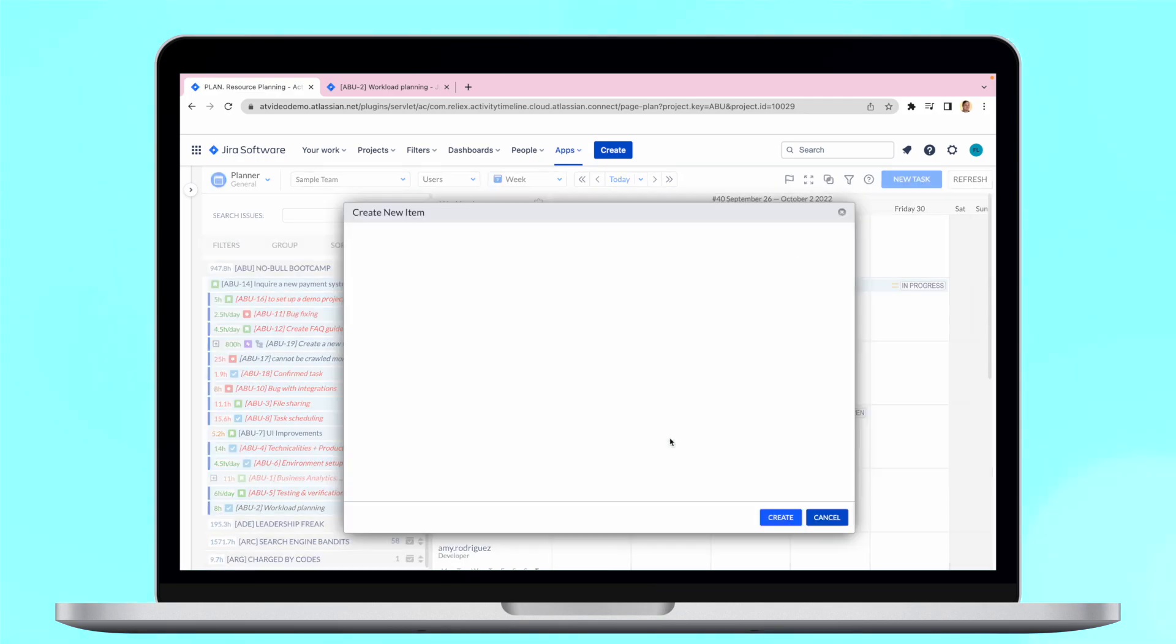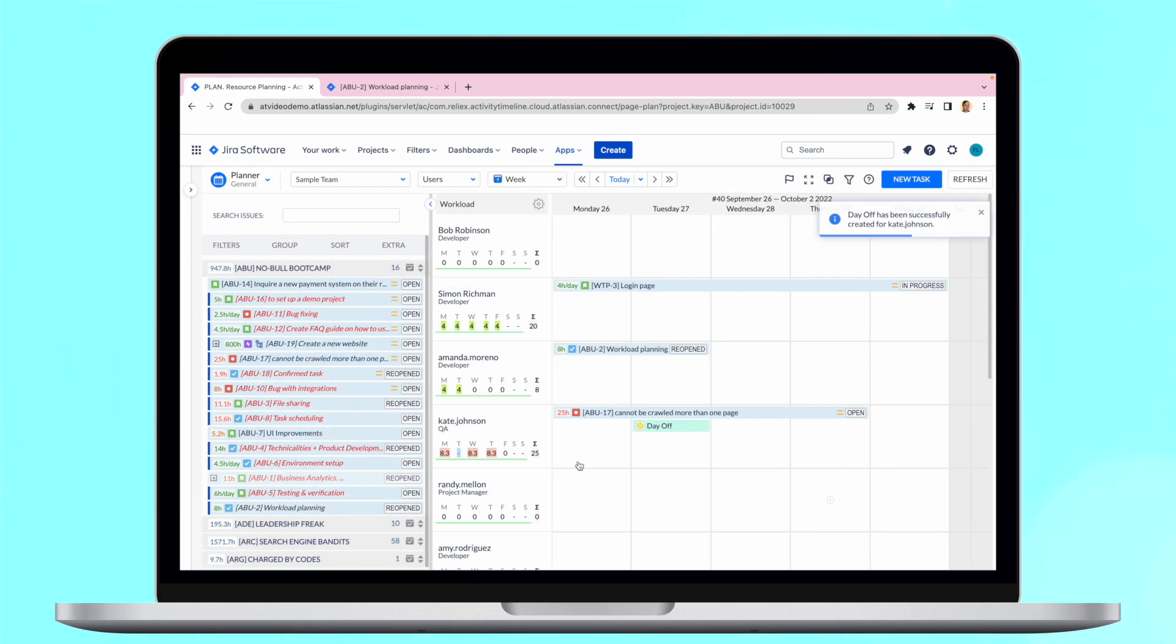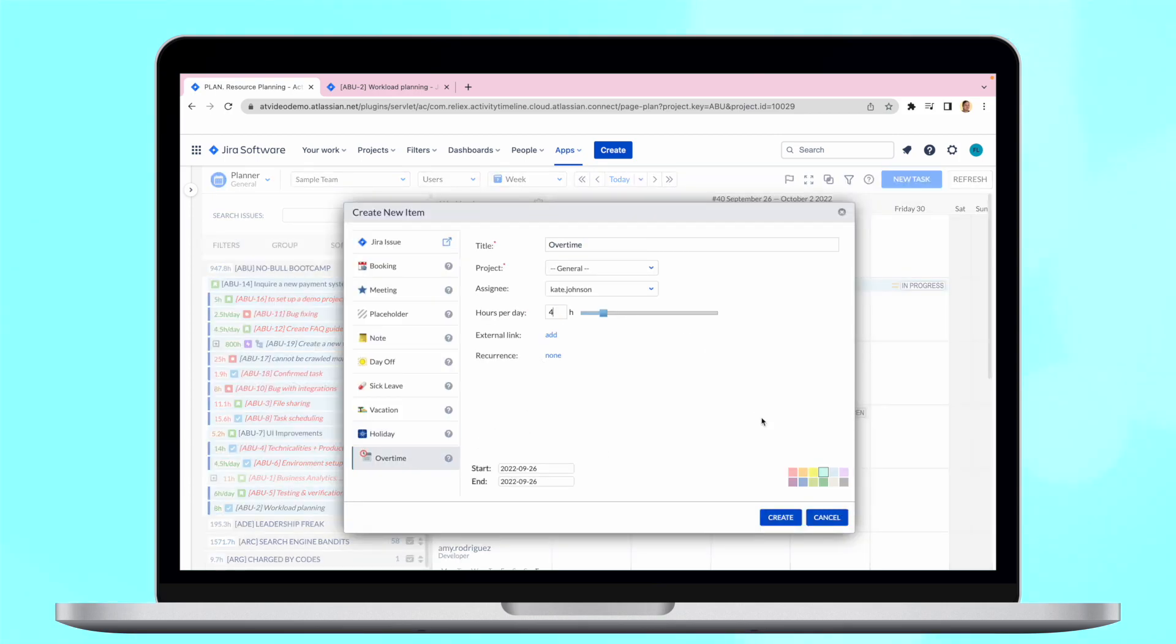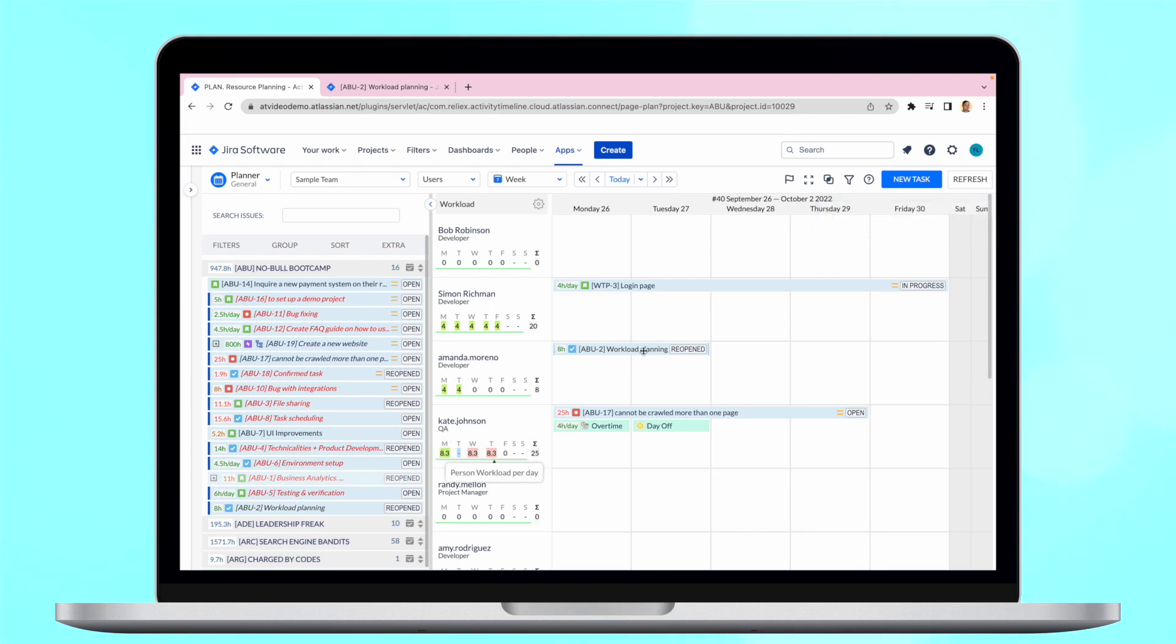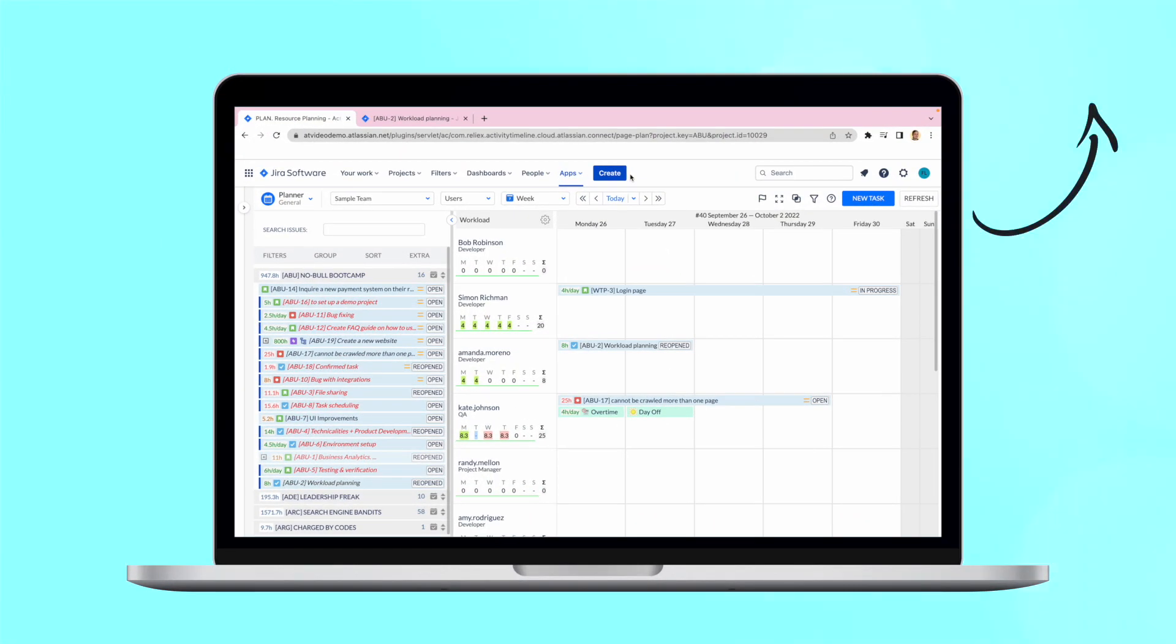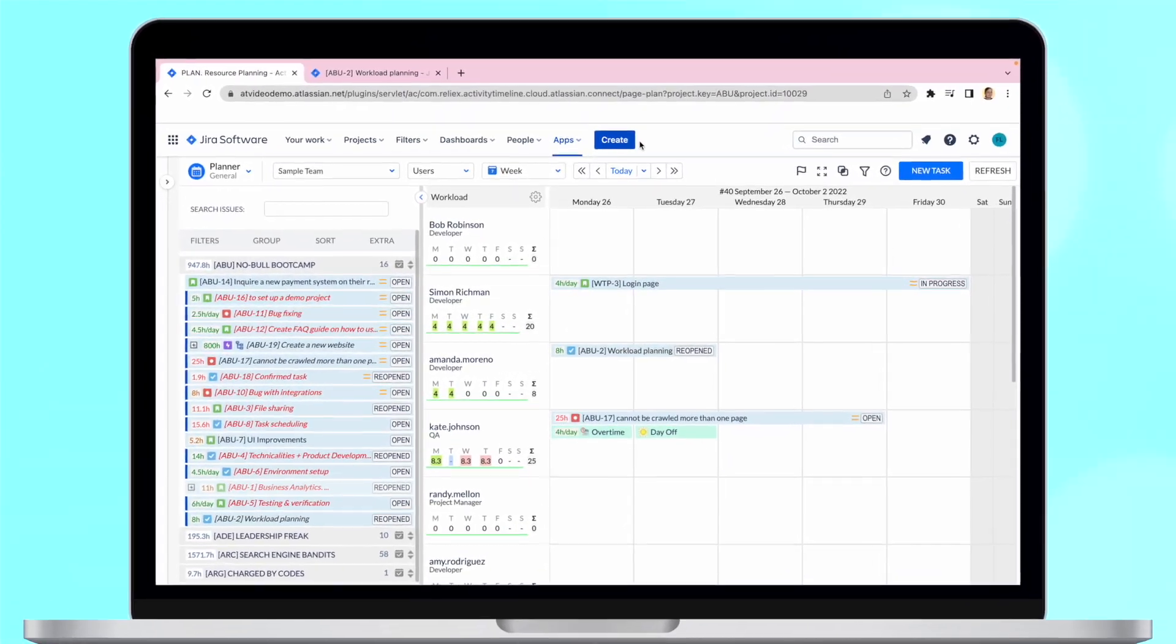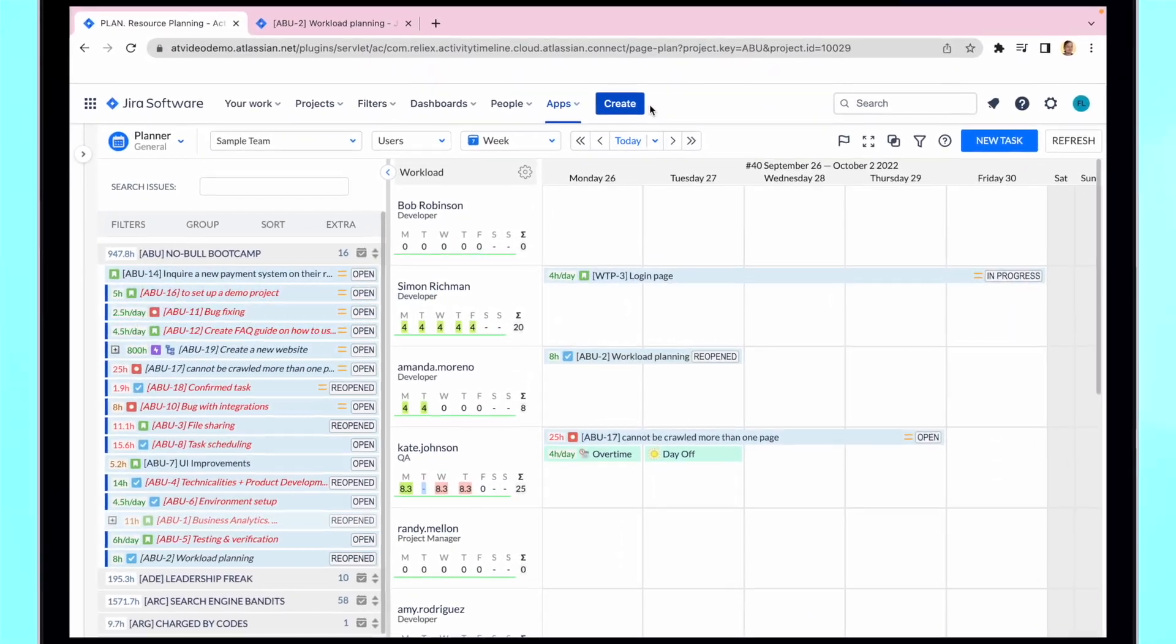Each of the events has its own feature. For example, a day-off event excludes a day from the availability of the resource, while overtime event works in the opposite way and increases the capacity of the employee by a certain amount. In this way, you're always sure when and for how much the resources are available. We have discussed each and every event type in one of our previous videos, so we highly recommend checking it to learn more about our internal tasks.